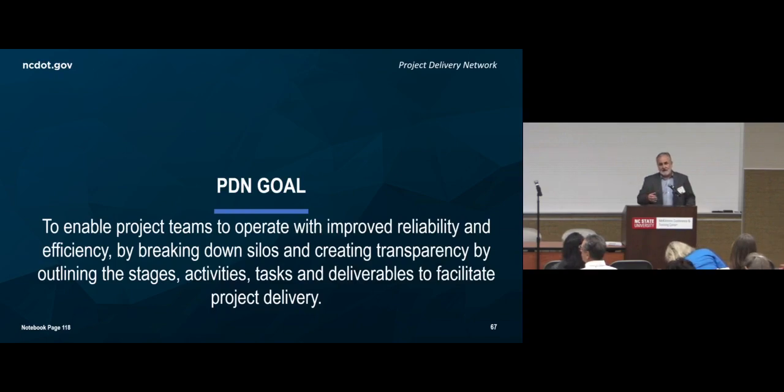And the reason that we've added the DOT task and the PEF task is because what we've come to see is that oftentimes a consultant gives us their schedule and it includes all of their stuff, but there's also stuff that DOT is doing. And if you're not really considering everything for the project, then in a lot of ways it puts the consultant at a disadvantage because we're asking you to deliver the project on time, but yet you don't know what's happening at DOT. So we've tried to fix that.